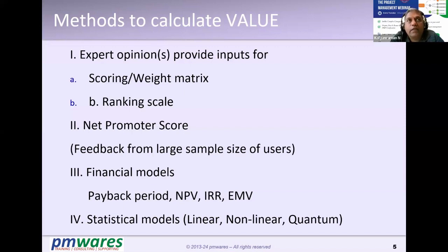How do we start building the MVPs and the MBIs as we go along? MVP is nothing but minimum viable product, and the MBI is the minimum business increment, which we add at every iteration. Now, this helps you to build some clarity. So, are we doing the right thing? Is there a consensus among the stakeholders as to what you want? Don't go by certain assumptions that we know the product best. It is better to consult and take that feedback.